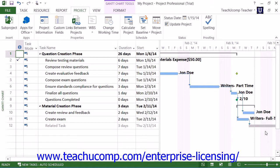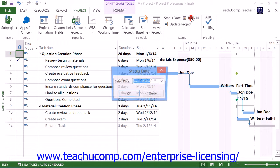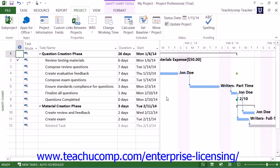You can specify the status date by clicking the Status Date calendar button that appears within the Status button group on the Project tab within the ribbon. In the Status Date dialog box that then appears, you can use the calendar drop-down to select a desired status date or simply type a date into the text box shown. Then click the OK button to set the status date.